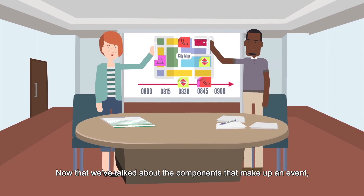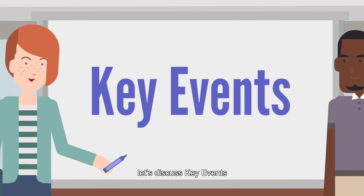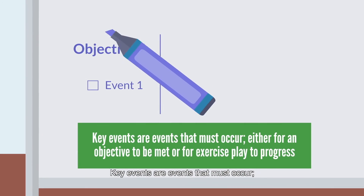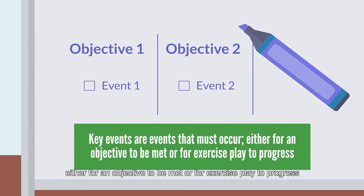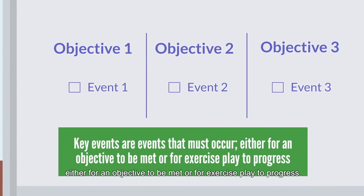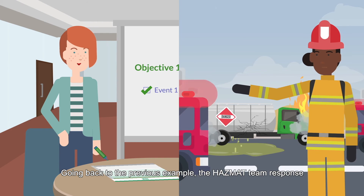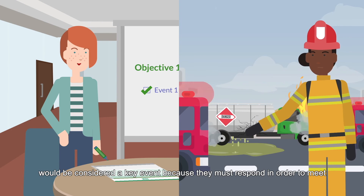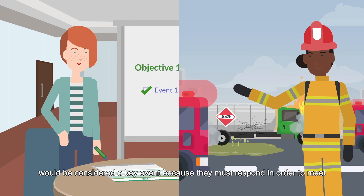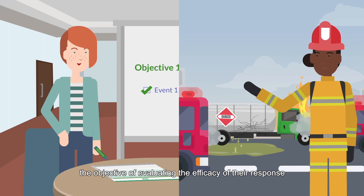Key events are events that must occur, either for an objective to be met or for exercise play to progress. For example, the hazmat team response would be considered a key event because they must respond in order to meet the objective of evaluating the efficacy of their response.